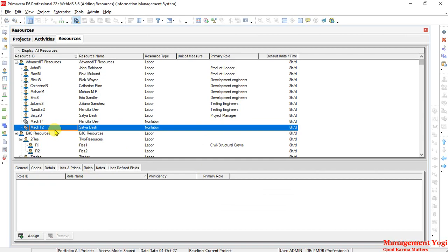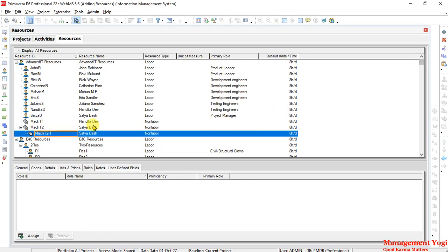Then how to add a material resource which is consumable. So for the material resource, again I'll do a Control C and Control V. Again we added, and this one I'm going to take. This is the DVD or the DVDs, or software for delivery. It will be related to the delivery work. So you can add DVDs for delivery. Again, do an indentation to the left, and we have DVD below, and we'll have to go to the details